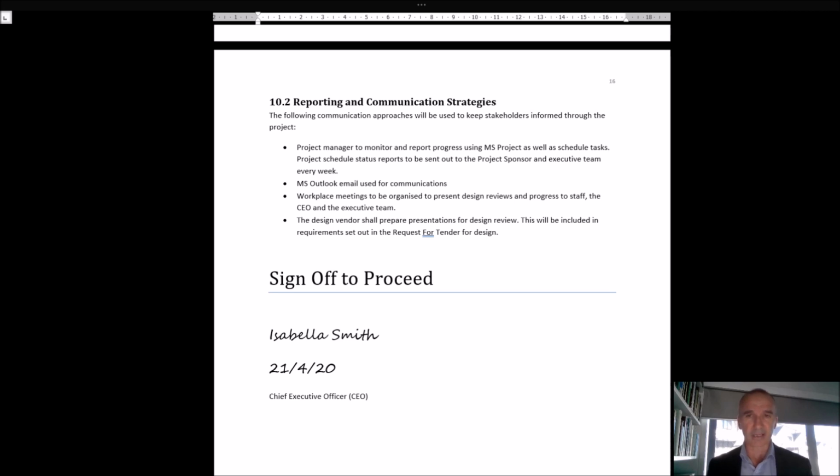So you go back and you start to tweak things until you get that informal approval. You might be doing that with other executives, or you may be preliminarily talking to suppliers to get an idea about timeframes and what we need to do for getting these uniforms and so forth. As I said at the start of this, you may have a number of different drafts as you go through this consultation process to try and get it right. Because once your sponsor signs off, well, then that's it. This is going to be the document that's going to be the baseline for your project until such time that we get a review on this scope.